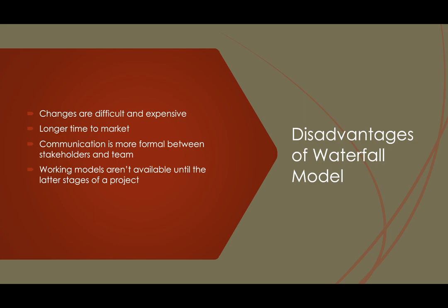Moving on to the next point, longer time to market. The waterfall model is designed for long-term projects and is completed sequentially. Each phase of the project depends upon the previous phase. It requires complete completion of the previous tasks before any work can be released. So all the tasks should be completed, and only then will the product finally be released. So it generally takes a longer time to reach the market. Whereas Agile uses a short iterative approach and delivers value rapidly.